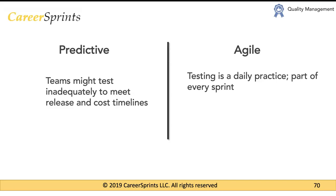In agile, testing is a daily practice and a part of every sprint. With continuous integration, developers integrate their code to the main code branch at least once every day, checking the quality of their work and ensuring it integrates successfully. Any bugs or issues found are eliminated on a daily basis. Combined with the definition of done at the end of every sprint, the amalgamation of agile practices means the overall quality of testing — and therefore the product — is much better.